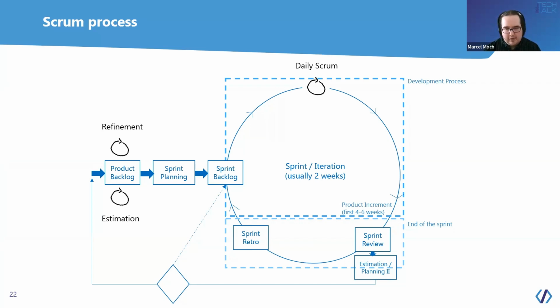If the first release has been done, major version 1, we usually have a continuous process where we add new features or also work on sprint feedback. Every time a sprint ends, we have a sprint review, as I said, and we could get any feedback on the features we've integrated. They would obviously have to be worked on in the next sprint.